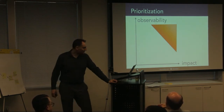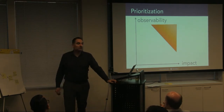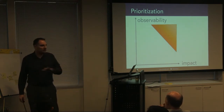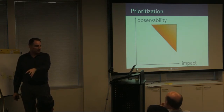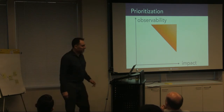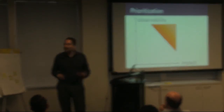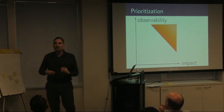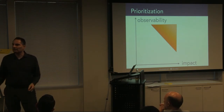Translating a requirements document to a map to have that discussion with the customer — is there pushback? If the contract specifically says you will build all of these things, you've kind of lost from the beginning with fixed scope. The worst case is fixed scope, fixed time, and fixed resources — the iron triangle nailed down — and you're pretty much bound to fail. It really depends on whether the customer is open to the idea that scope is at least somewhat flexible. On the question of how to work in the idea of a minimum marketable product: if it's internal, it doesn't really matter that much. But even then, it's really hard to get people away from the idea that they want an application — 'I'm going to get my portal, everybody else has a portal and I want one too.'